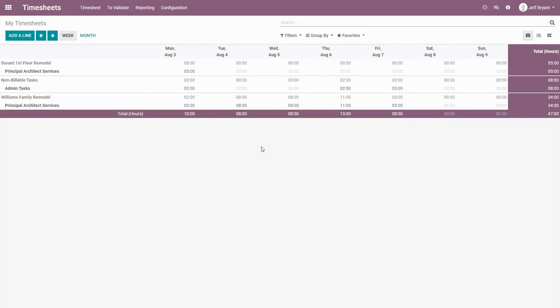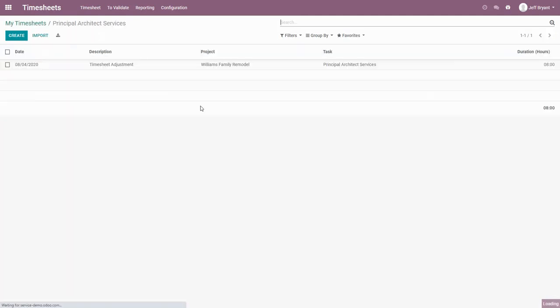And as your team is getting used to entering time, I also find that there's a nice feature where you might ask them to put a little bit of notes behind what was taking place with those hours that were entered. Once the number is in, you can hit this little plus sign, and the default description is just going to say timesheet entry, timesheet adjustment. And here you could ask your employees and your team to add some sort of description that would help you understand what they worked on, and perhaps you might print out the log of time entries and share them with the client if they wanted more understanding of where all the hours had come from.